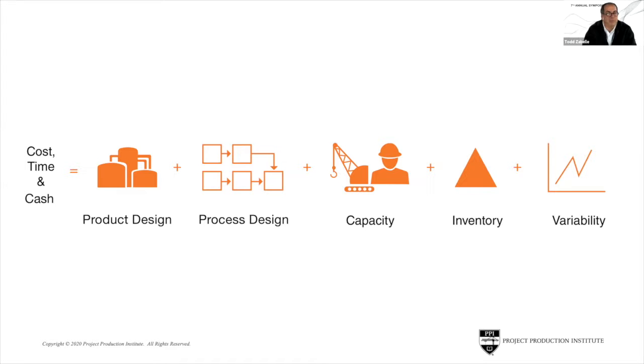I think most of the people on the line understand all this, so we're not going to spend too much time, but what we can say is inventory, which is not considered in project management anywhere in the methods and processes, is a proxy for time. So if you want to predict what might happen, if you want to know what's going to happen in the schedule, if you measure the inventory, specifically the work in process, you can actually predict how long it's going to take. All right.